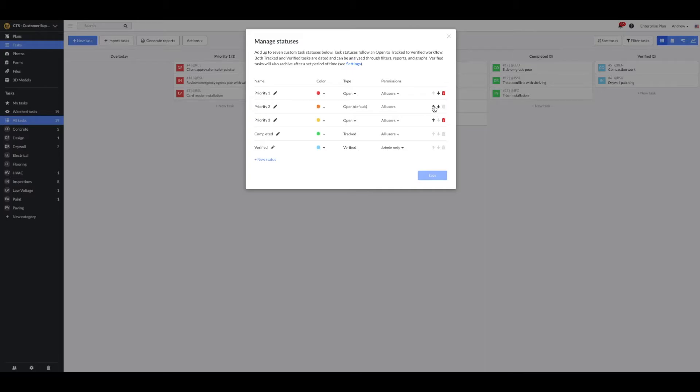Use the arrow options to adjust the order of the task status. Keep in mind that these follow an open to tracked to verified workflow.